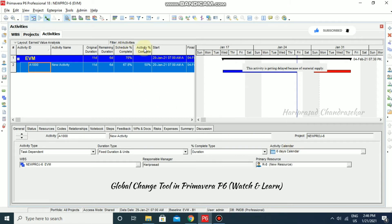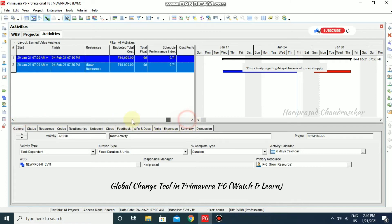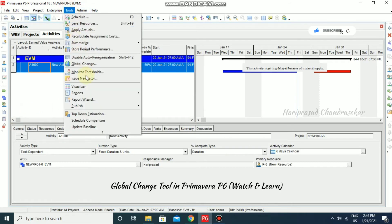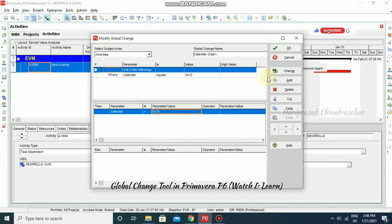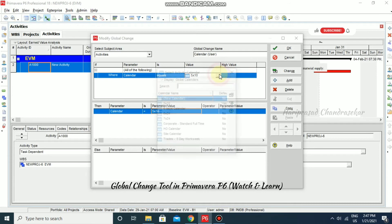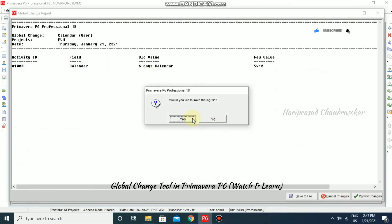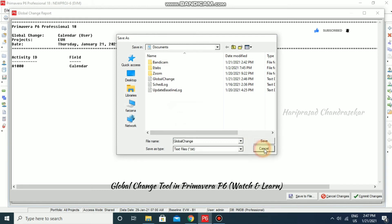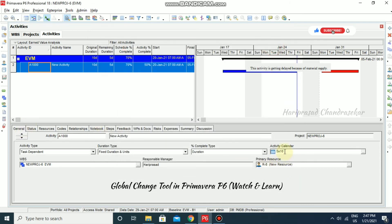The schedule calendar and activity calendar are now completely changed. We also have a Modify option — for example, if I want to put the same rule back, I can go for Modify and run Change again. Since there's no old value listed, I set the Then value to Five Cross Ten calendar, run Change, and commit — it reverts back to the previous Five Cross Ten calendar, as we can see here.